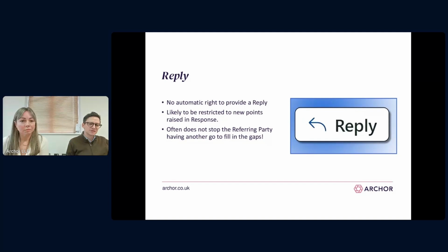One strategy which I think should be deployed fairly rarely, but it is an option, is for the referring party to save up evidence for the reply. It might be that you've got a report that you don't want to give initially. You want to almost tease the responding party out before you serve it. Although I think that's quite risky, one, because the adjudicator might restrict the scope of the reply.